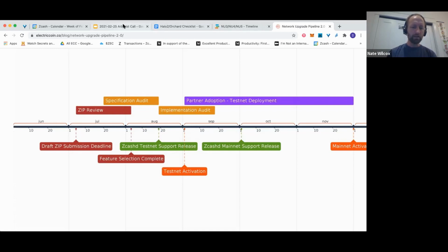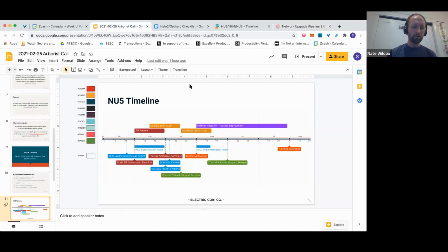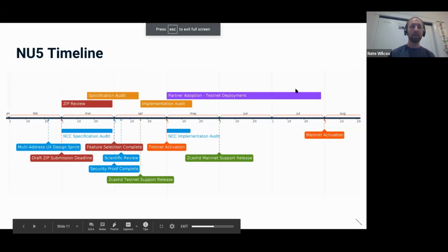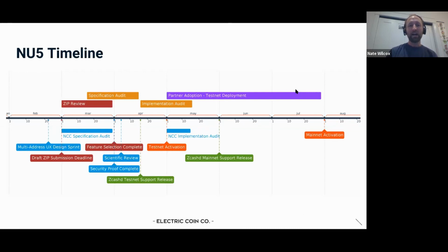So I do think, when we talk about the wiggle room, there is a gray area, and it is getting much more complex with Zebra coming online, which is awesome. But that means, for example, let's say a flaw in the protocol design is discovered in late April. It's easy to say, if fixing it takes 2 weeks, then let's push it back, and if it takes 3 months, let's postpone it to the next upgrade. But we won't know for sure how long it will take to mitigate.